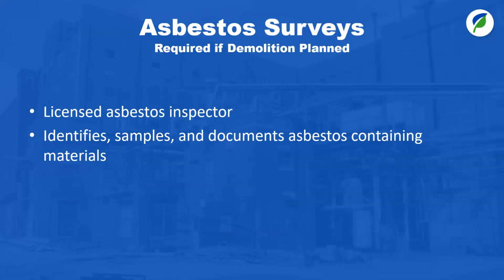Asbestos surveys, we do a lot of these, especially if it's renovation or pre-demolition. We use licensed inspectors to assess what amount of asbestos materials are in a building and try to wrap our head around the costs of removing the asbestos as a future remedy cost. Next slide.